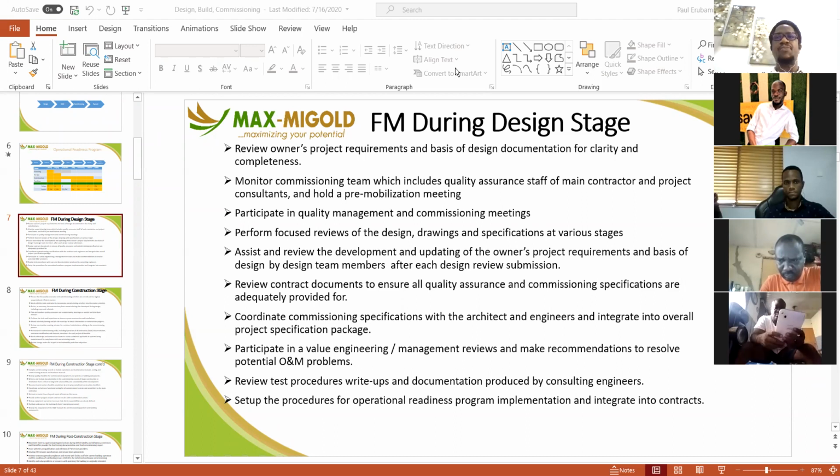You know, we did that graph in one of our earlier classes about how difficult it becomes as the building is advancing in its life cycle to make changes, right? So now that you're still in design, it is easier to make those changes. It's easier to allow for manholes, for chambers, for bigger pipes and 45 degree angle bends, for valves at certain places, all in all. So you must review not just architectural, but mechanical, plumbing, everything,